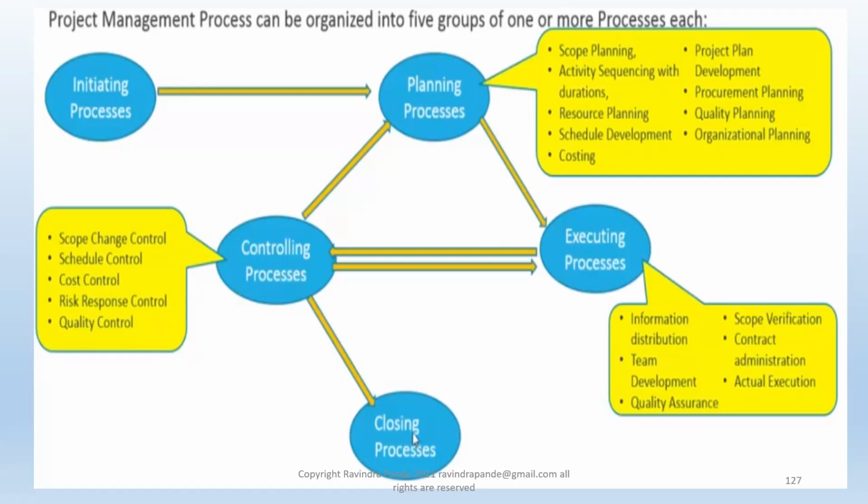We have something called a change control board. It's a committee of one member or might be a couple of members depending upon your organization's thought processes. We normally route any change via this change control board. Here we have estimators, we have a good task scheduler built into this team, which checks any change request coming via the client and tries to prioritize it in the current phase, current sprint, or next phase, depending upon the length and breadth of those change requests.